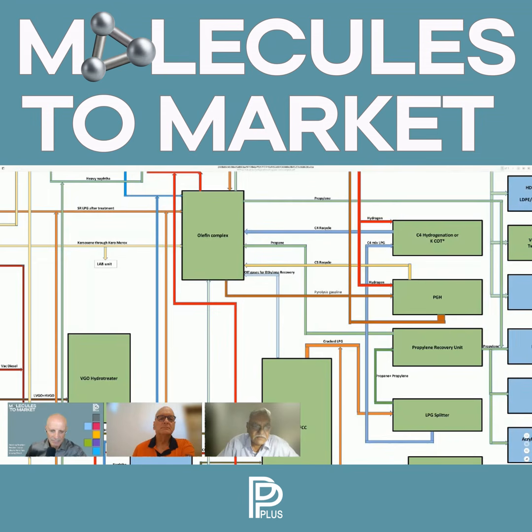So the project execution team is very large. But the most important advantage is it is the least cost, least schedule. That means if I look into the total implementation duration, this is the minimum duration which can come through this particular route, because we do not believe in the concept of completing engineering and then implementing.